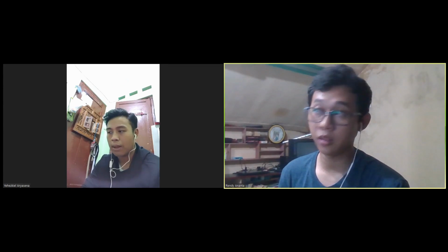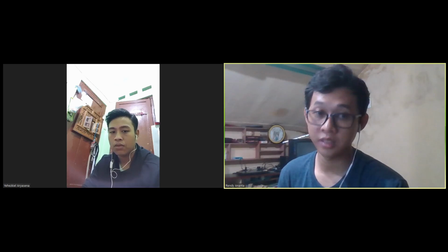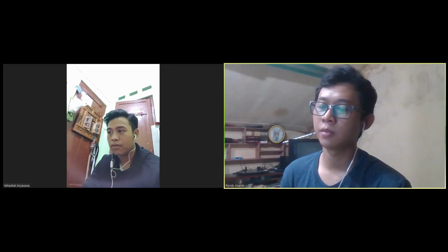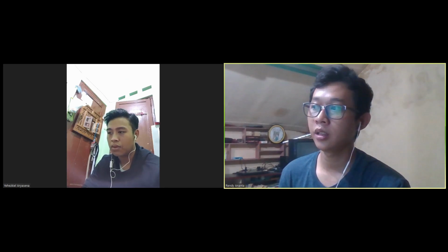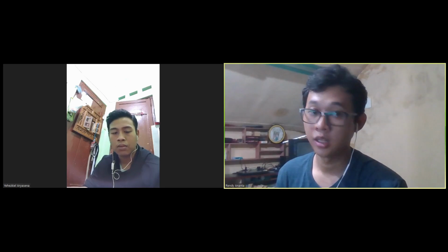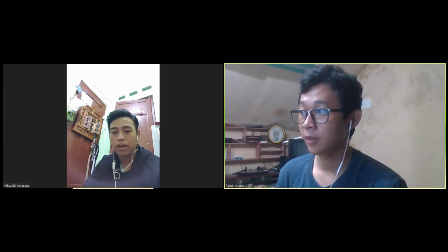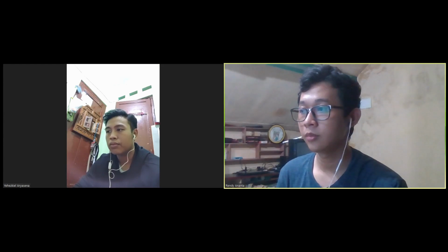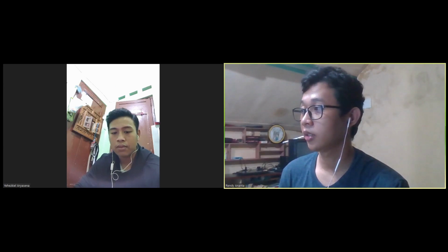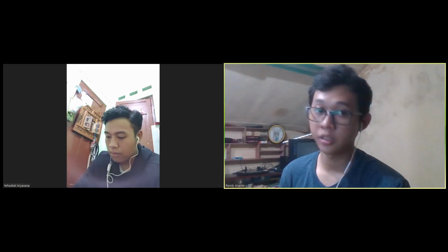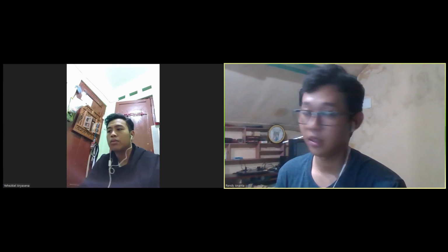And the second one, the PERT method, is a useful technique which helps to increase the accuracy of cost and time estimates. There are three parts of this technique which provide three different estimates. The first one is the most likely estimate, assuming a normal case in which everything goes as usual. Then the pessimistic estimate, assuming everything goes wrong. And lastly, the optimistic estimate, assuming everything goes as planned. The duration of an activity may be more accurate than expert judgment, but it will take more effort in a small or medium project. I think so. That's all.